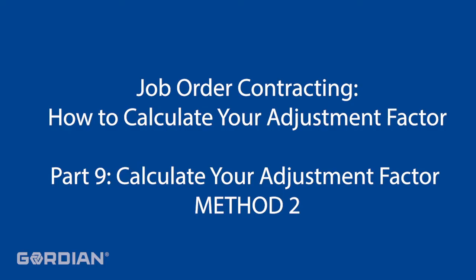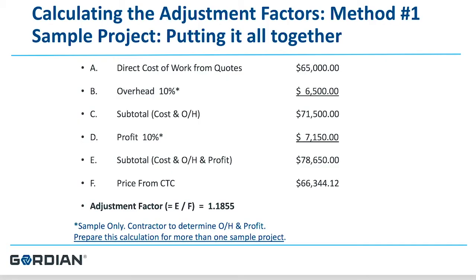Another direct way to calculate your factor is to calculate how much general condition expense you will have for the first year of the contract. In the solicitation, the owner will typically tell you the approximate yearly value — how much work they will order from you each year. In this example, the owner is going to offer $3 million worth of work over the first year. How much does it cost you to manage $3 million worth of work?